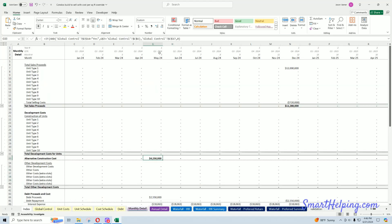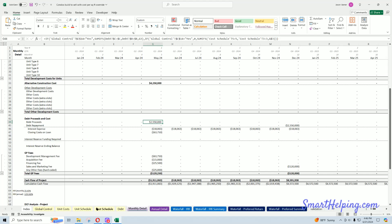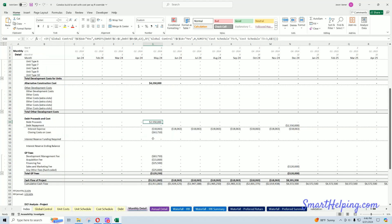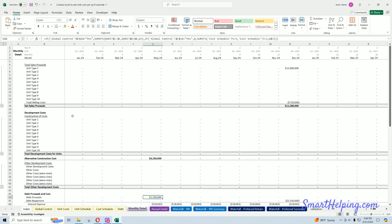So month five, in this case, it's this alternative construction cost row, and then any debt will come in that same month. You can see here, debt's coming in, you've got interest, and that overrides. You can see all the other construction costs are now zeroed out.